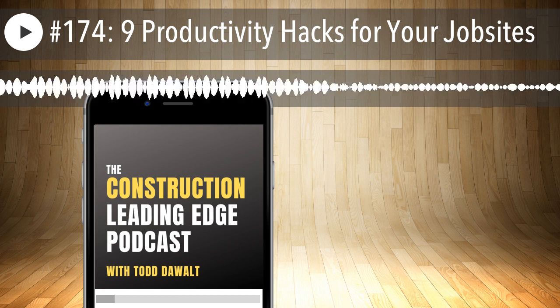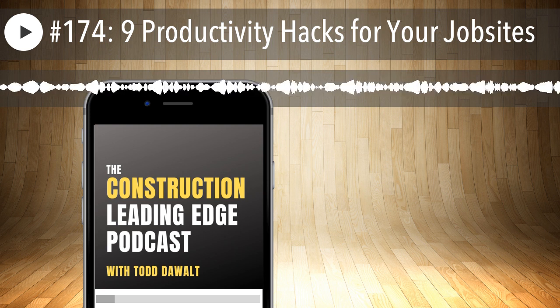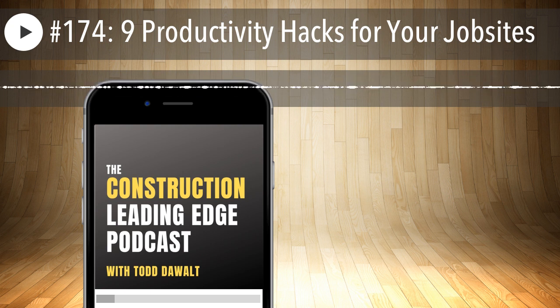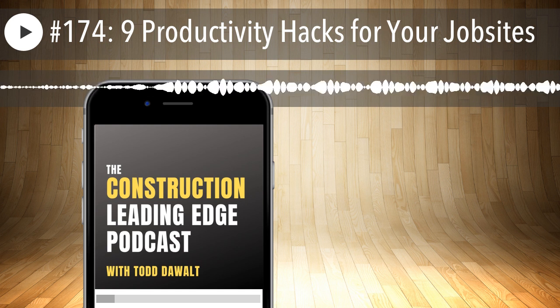So what this would look like for you would be, think about the issue where you have the most rework, or the most questions, the most problems, and then take pictures of a proper installation. Maybe it's garage door header framing, or firewall framing, or in-wall blocking, or specifically the control joints around a dock level or pit in a distribution center. This is one that I've dealt with a lot in the past. If you don't want your concrete to crack, you don't want re-entrant corners, there are certain things to do.